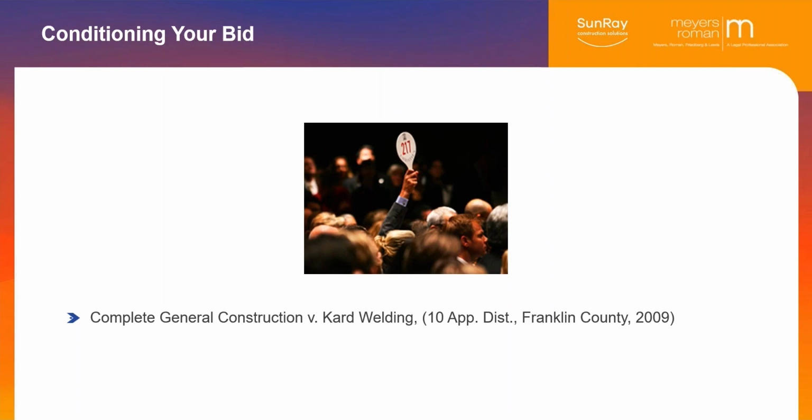All they have to do is use terms that are common in the construction industry, like you didn't want a pay if paid clause. Well, if you didn't say I'm not going to accept a pay if paid clause, they can give it to you because it's common in the construction industry. I know I'm funny because I'm a lawyer and I like to read stuff like this, but this is really a good case to read. It's short, maybe it's 7 or 8 pages, but it shows the history of how we got from 1958